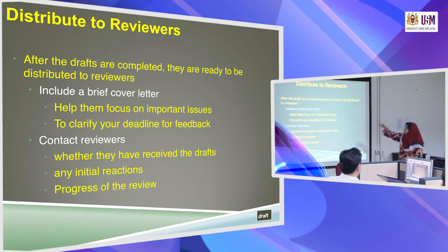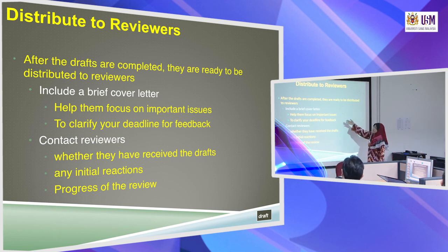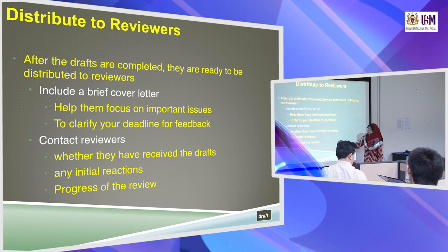After drafts are completed, they are ready to be distributed to reviewers. Include a brief cover letter to help them focus on important issues. How are you going to help them focus? Maybe for the most important key points, you make them bold, for example. Clarify your deadline for feedback. Contact reviewers again to ask whether they have received the draft, any initial reaction, and the progress of the review. Still review, review and review.